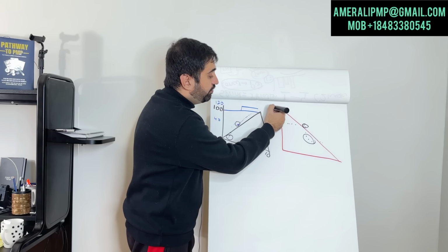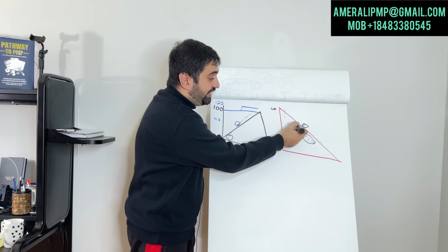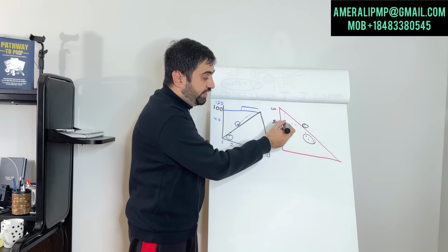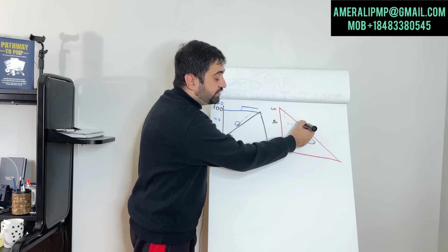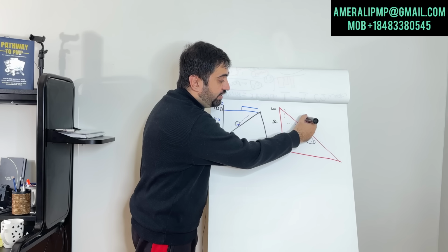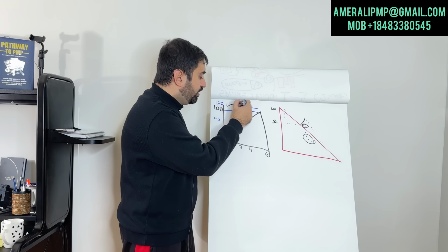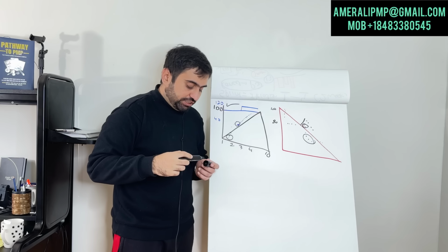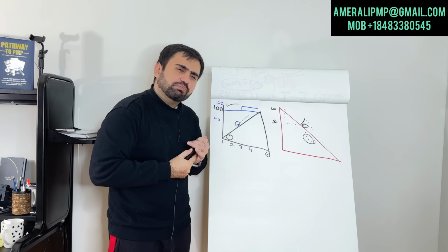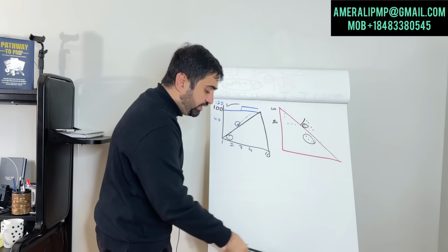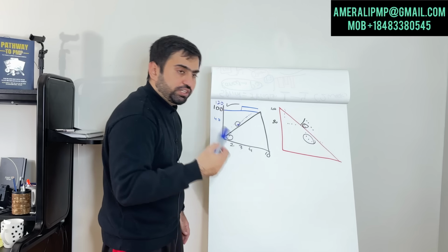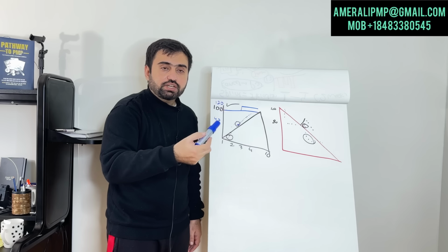You see, if it was 100 story points and at any day, let's say it is 80, 20 story points come here, you can get a spike here and then back to here, but it cannot actually represent that. So I will always use burn up chart when there's a chance to increase the scope. Which is better? Both are same. Both are used for the same purpose. They are showing how much work is remaining, how much work is done.